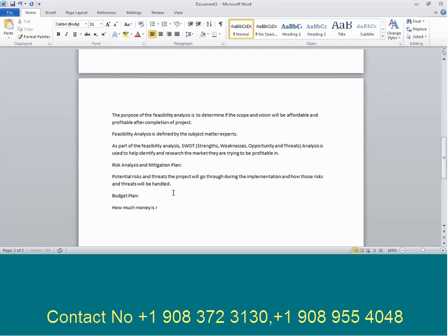That is, from the technology side, the technical manager or the project manager will review the scope and vision, and based on the scope definition, they will give a budget estimate. This budget estimate, the initial estimate provided by the technology manager, is called the L0 estimate, level 0.